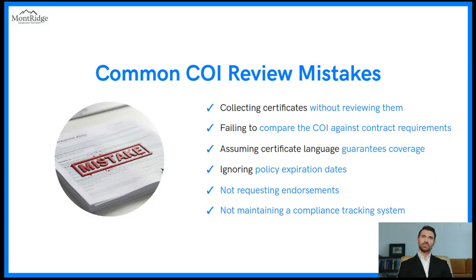Common COI review mistakes: collecting certificates without reviewing them, failing to compare the COI against contract requirements, assuming certificate language guarantees coverage, ignoring policy expiration dates, not requesting endorsements, not maintaining a compliance tracking system.